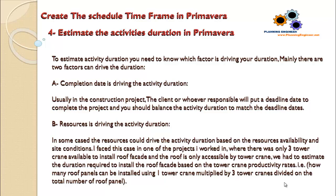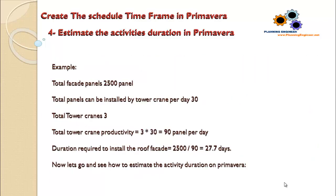For example, this will show you how many roof panels can be installed using one tower crane, multiplied by three tower cranes, divided by the total number of roof panels.